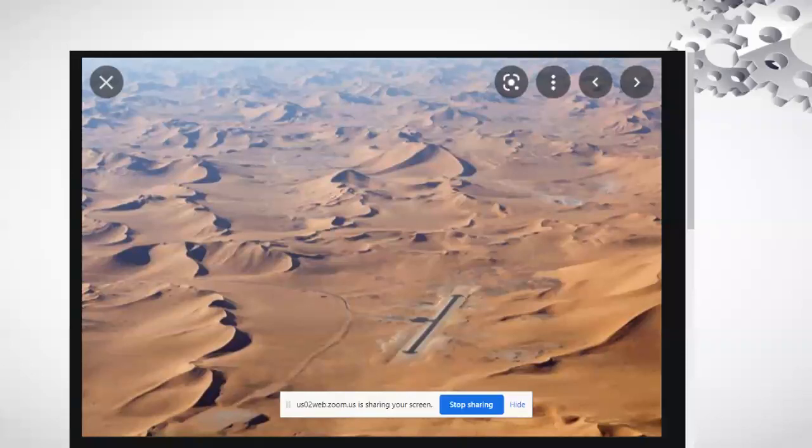When I was working on this story, I talked to many friends of mine who work particularly on the core of this project. I understand that the only way to reach this site in the initial days was by flight. There was no road connection from the nearest town to this site, and the only way people could travel was by charter plane. After construction started moving on, they had to move the heavy machinery to the site, so they had to build a road first.